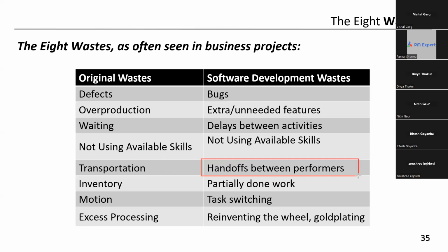Tell me, if there are cross-functional teams, self-managed teams, will the handoffs be less or not? Highly collaborative teams, right? You won't be sending even an email. You are co-located, you are discussing, you are sharing. You are not dependent on emails and handoffs, right? This will minimize the handoffs. That's why we say that in Agile, we need highly collaborative, self-managed, cross-functional teams, which will minimize the time lost because of handing off work from one person to another.